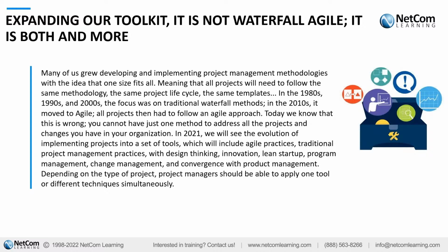In a project world, the waterfall approach is still very much viable. Remember, it's not that it is out of scope. It's still very much viable. Projects where the impact of change can be huge, can have a drastic impact, or can bring in a situation where the project is no more viable. In these kinds of environments, you probably want to use a waterfall approach.